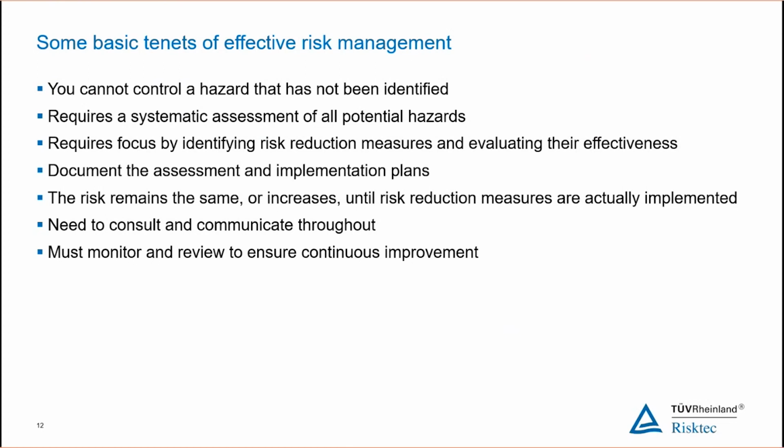If we're going to make that claim, then we have to be in the position of assuring ourselves that that control does its job throughout its lifetime. So we may require performance indicators that give us a warning if a control is not performing to that function, because if it's not, we're not managing the risk to the level we thought we were, and therefore it may not necessarily be an acceptable risk to us at any point.